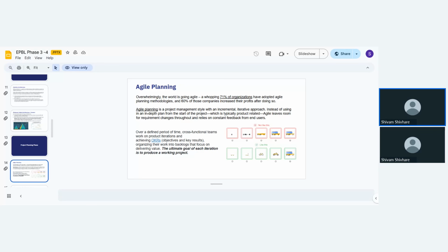For example, think of building a website. A traditional approach might be planning the single page, right? First, you plan the single page and features before writing any code. The Agile approach would start with a simple functional homepage. Next, it will get feedback. Then it iteratively adds more pages and features based on what users actually need.